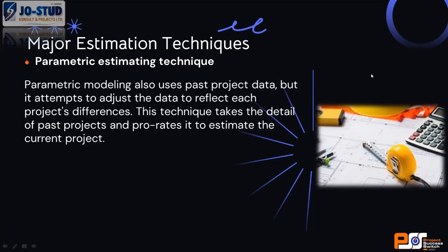If I'm running a project already, from the budget, the BOQ, the first thing I will do is divide my cost by the total area. I will know the average cost per square meter. If I'm done with the project, I will divide what I used to execute that project by the square meter area. It will tell me how far I am from what I am supposed to be. So your baseline can come in different forms, even in cost per square meter.